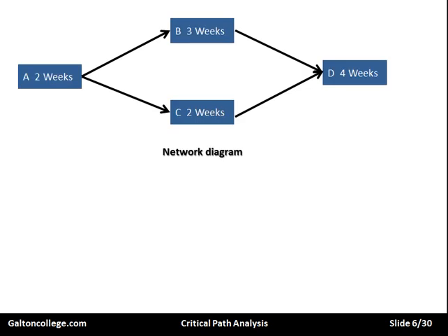So here's a simple, straightforward one. It's 4 activities, A, B, C, and D. And you'll see from the diagram that B and C must be completed after A has been completed. And D follows on from B and C. So in fact we have 2 routes. I'll just put the cursor onto the screen. We could go up and across, or could come down and across.